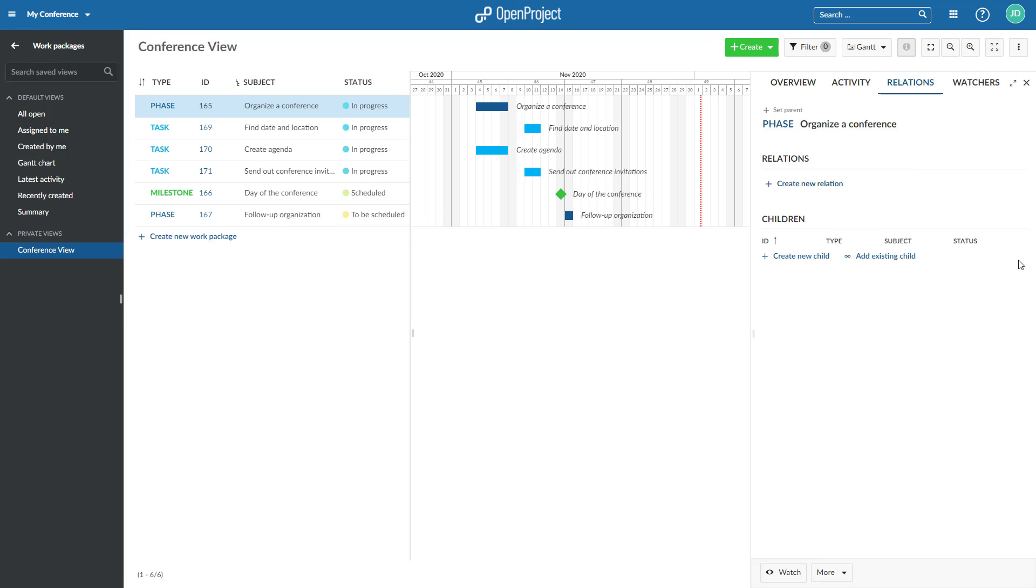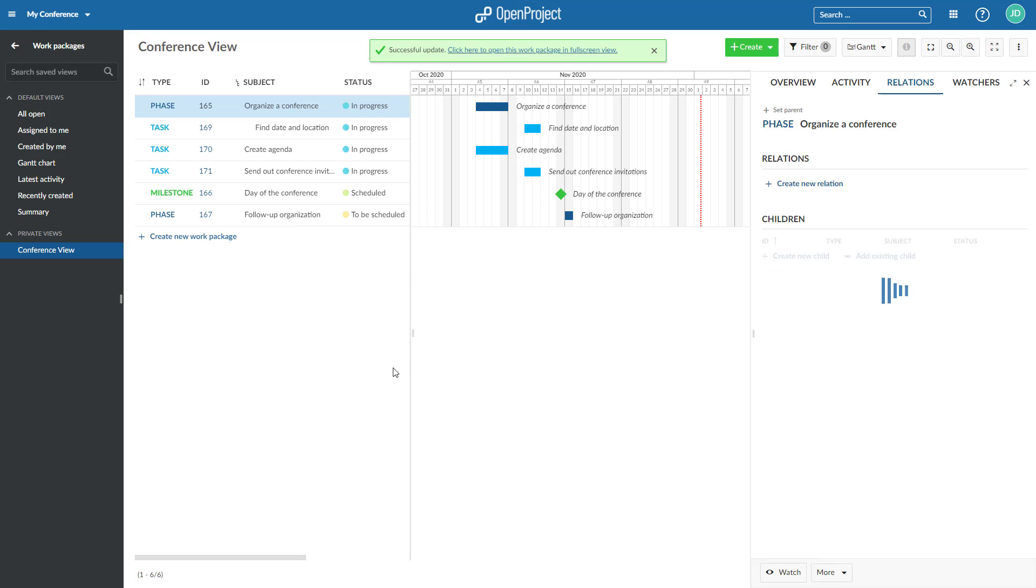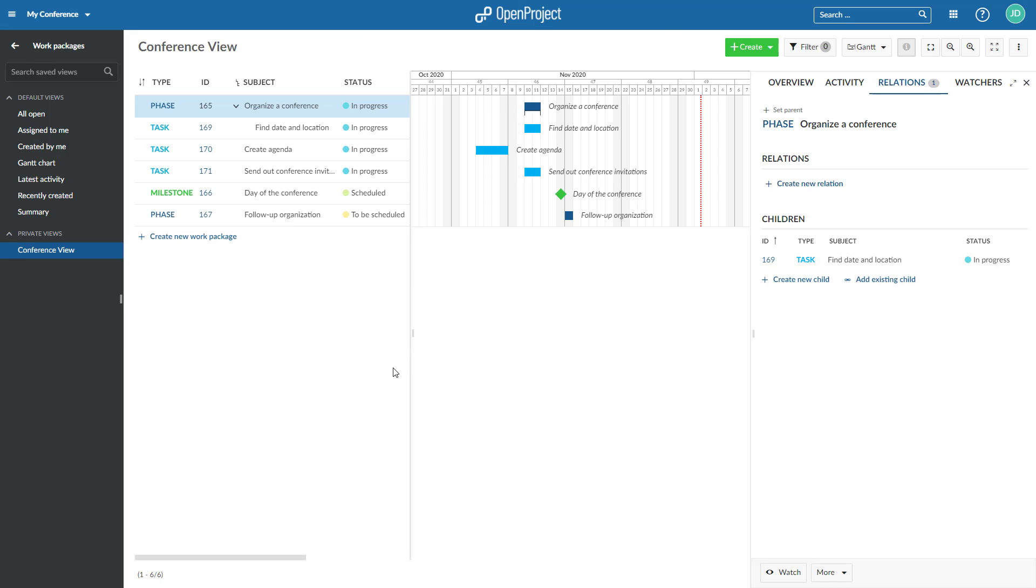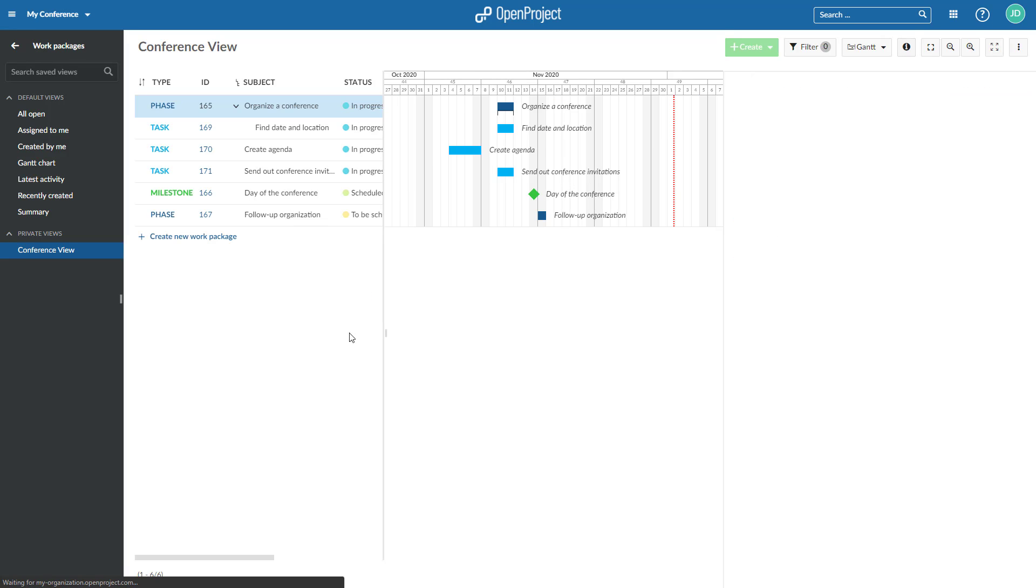Alternatively, you can assign an existing work package as a child with Add Existing Child. Also, you can right-click on a work package directly in the work package list and select Create New Child.